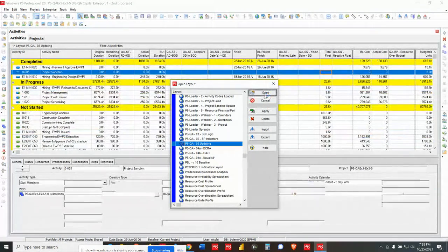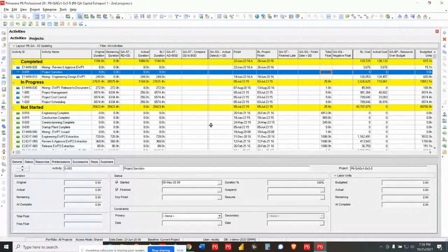So once they start updating, you want to make sure that things are still in a good quality standard. So you'll reuse your logic ones because you've already got them there. Because if they've introduced new activities, maybe they've deleted activities by mistake, you want to be monitoring that logic to make sure they still hold together. You also want to be monitoring the updating. Okay, so actual dates. Do the actual dates make sense? And one of the first things that you want to look at is durations and dates. You want to see if things are going longer or coming shorter.